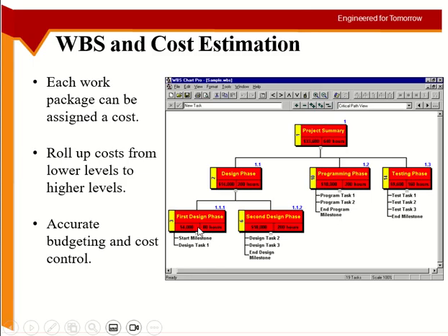For example, you see here the first design phase. This is the duration and this is the cost. Same thing here, same thing here. The important part is we need to define the cost and duration of the end of the work breakdown structure activities, so the last ones. And the one which is on the top will be a simple summation of these things.